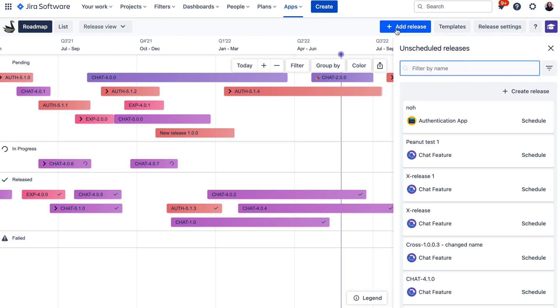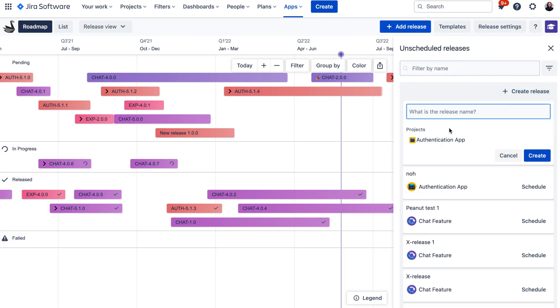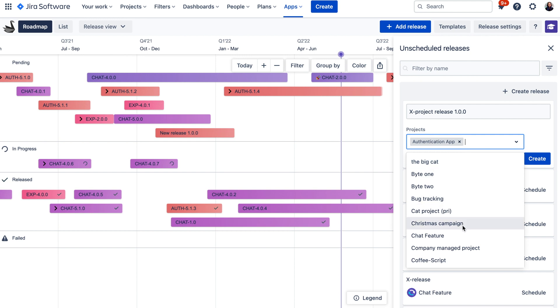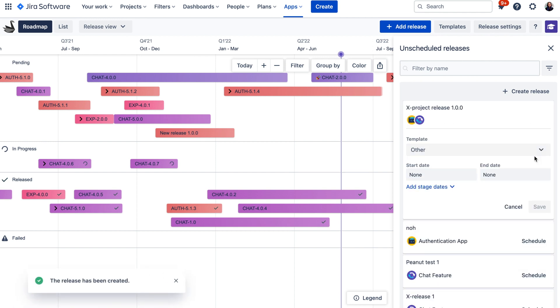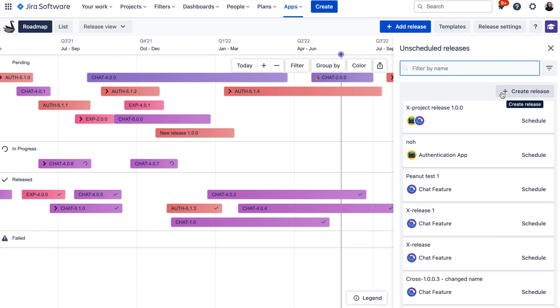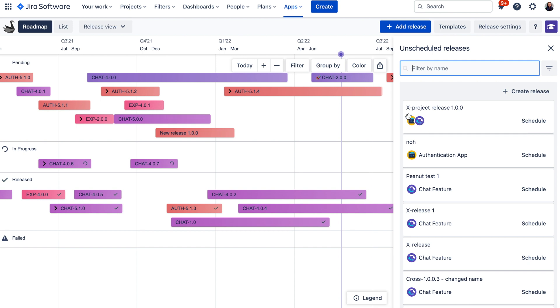Swanly allows you to create cross-project releases, which are releases that can be used across multiple projects. You can create a cross-project release from the Add Release panel and select the projects you want to include in the Projects field. Once you create this release, Swanly creates a release in each selected project and any changes made to these releases will be synchronized so the release acts as one. For example, if someone changes the release name in one of the projects, that update will be distributed to all other projects too.